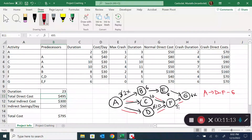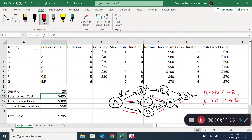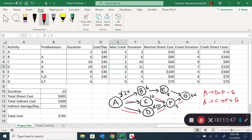Checking A-C-F-G: 2+10+5+6 = 23. So in addition to A-D-F-G, I now also have A-C-F-G as a critical path. I consider reducing D one more time for 25 dollars, but reducing D alone won't help because A-C-F-G's duration won't change — it will still be 23 days even if A-D-F-G drops to 22.